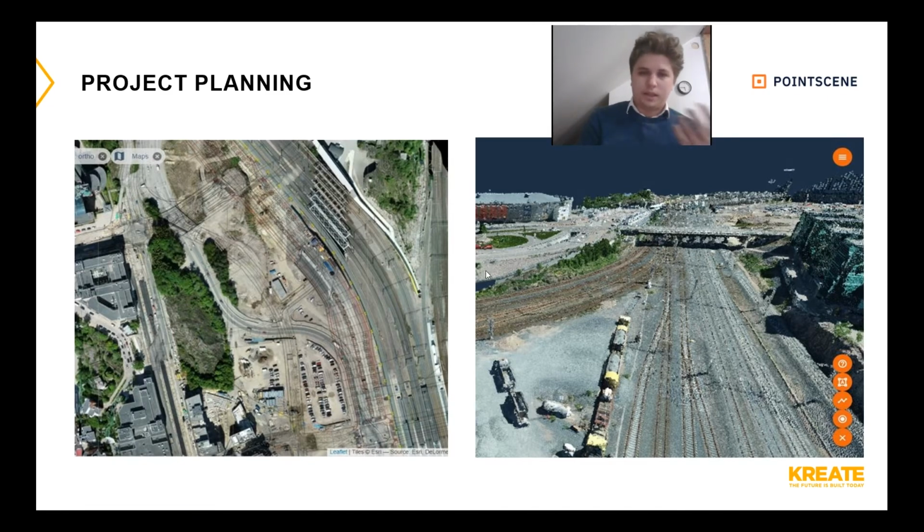And in similar ways with the design and construct projects. When we get the ortho mosaic and the design files on top of each other, it's so much easier to see what kind of build layers we can already utilize on our project, and where we really need to build everything up from the cut layer. So in the perspective of winning tenders or finding innovative technical solutions, this project planning has really helped us make much better solutions for the project and execute them, so we can do specific construction phases much cheaper or faster, and get the whole site organized and pre-planned much more easily. That was the biggest revelation: hey, drones, point clouds, wow, that was really beneficial.